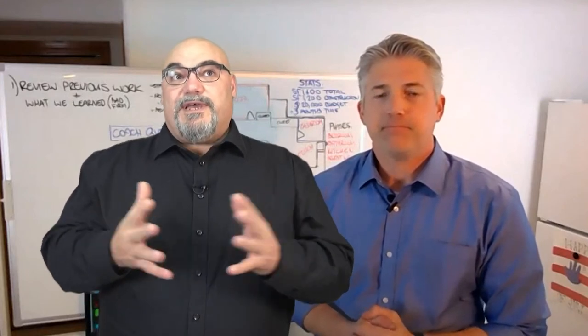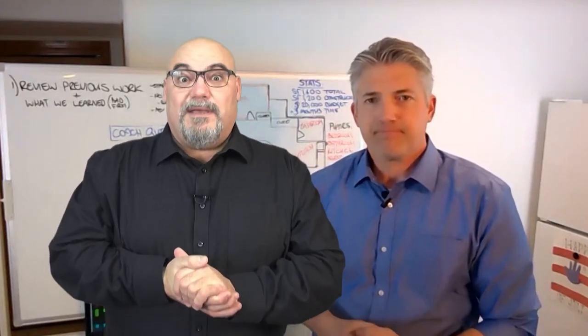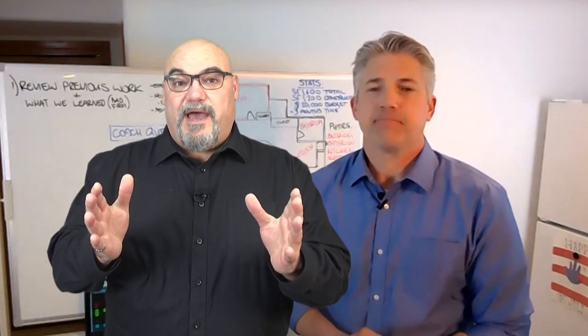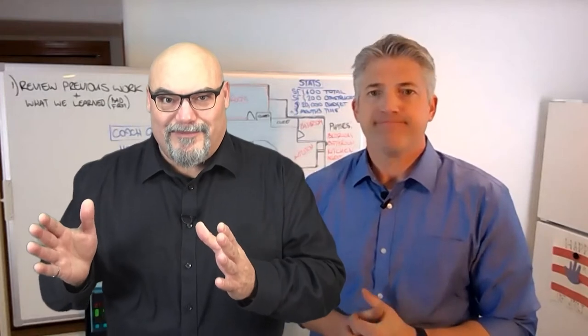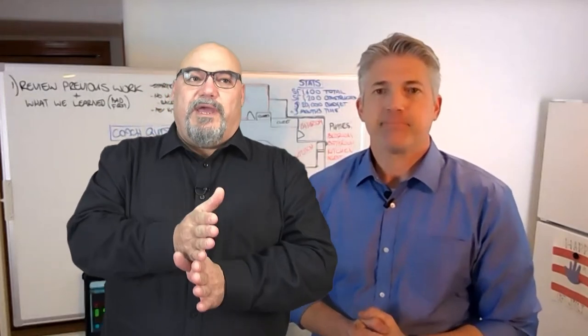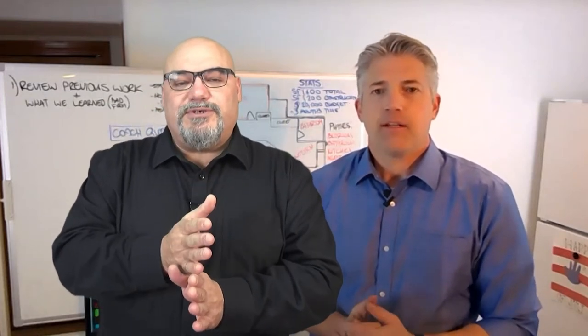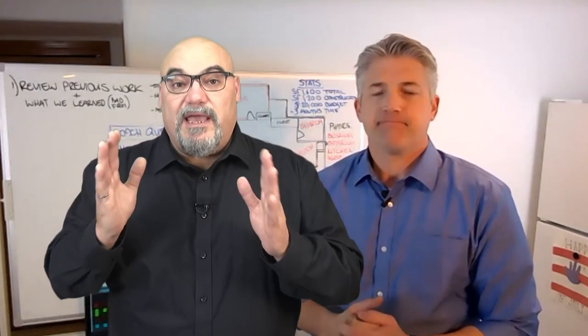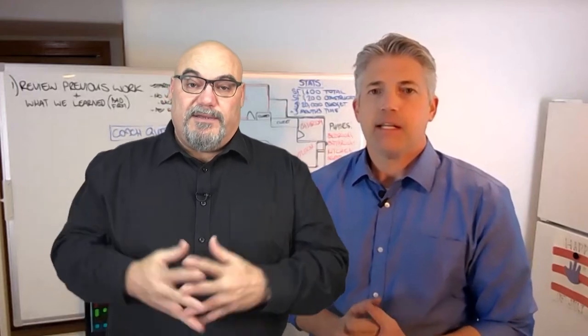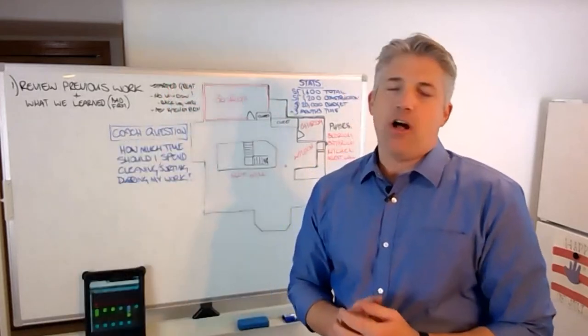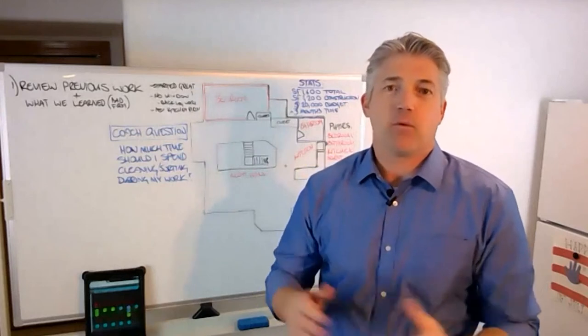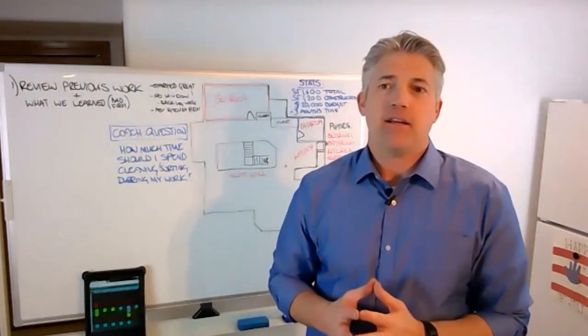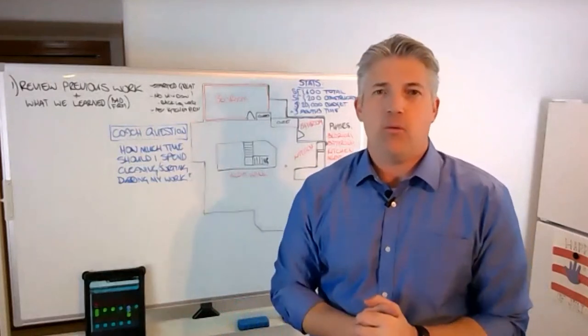Okay. So what you're saying is the window didn't arrive on time, but you kept yourself busy with work that didn't have a clear drop-dead date for the week. So where are we for the week? How many hours would you say are rolling into the next week of work that you have to complete if you wanted to stay on track? Yeah, we're definitely a solid two days behind, and I'm allotting half days of work for each of our days. So we're at least eight hours behind with starting framing of one of our walls.